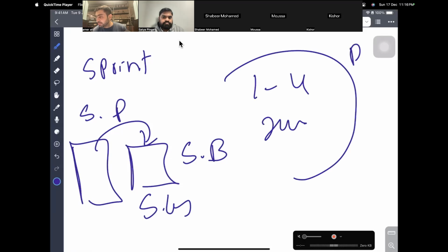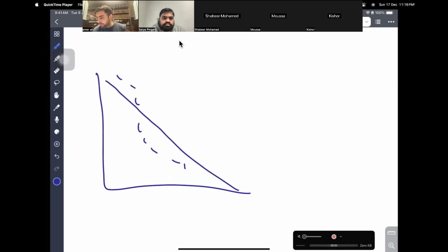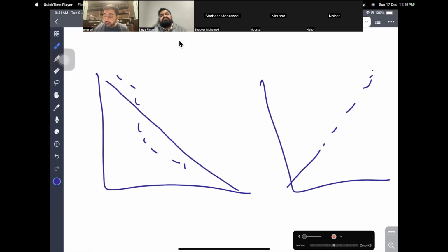We have daily stand-up, same time, same location, discussing what you have done yesterday, what you are going to do today. Is there any impediment, roadblocks, things like that? We will discuss those things on information radiators in daily stand-up. What are information radiators? Your burn down chart, how much work is remaining, or your burn up chart, how much work is done. That is information radiator.